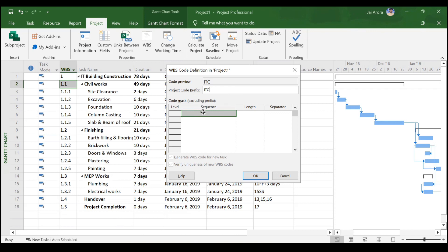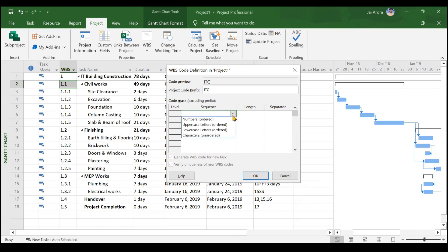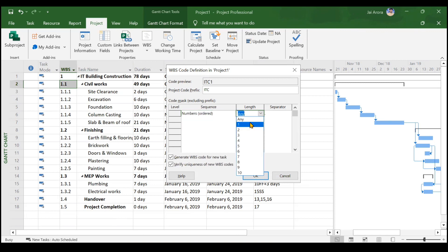Right now only ITC shows because we have not personalized the levels yet. The first level is the top, the second level adds .1, and the third level adds another .1. We usually have three levels, but you can define four if needed. For the first level, let us keep it as numbered, with a length of two, and a dash as the separator.